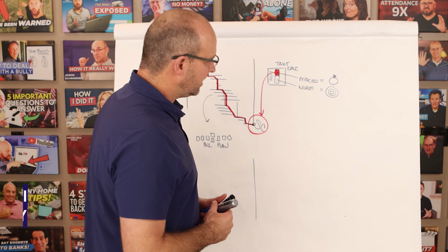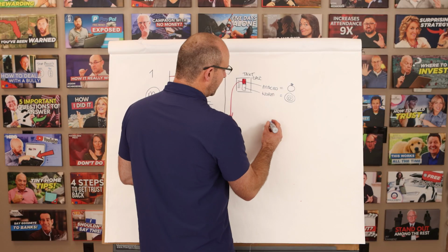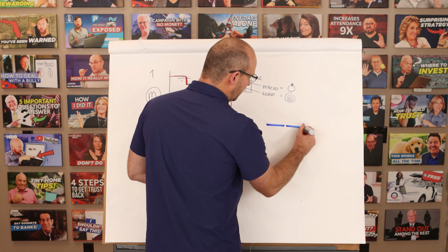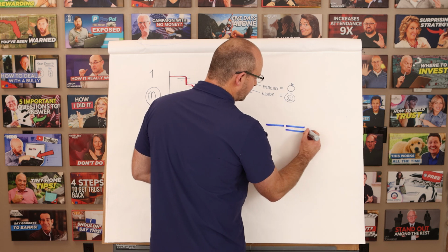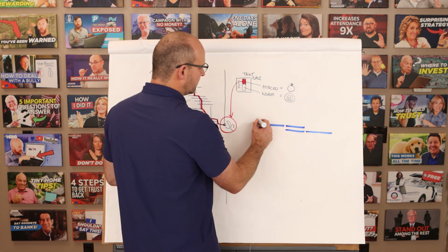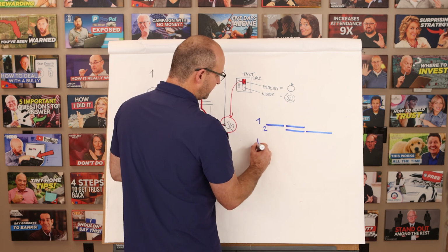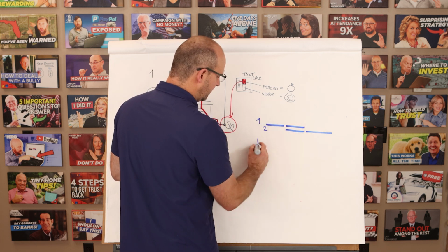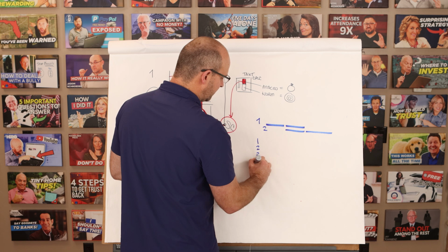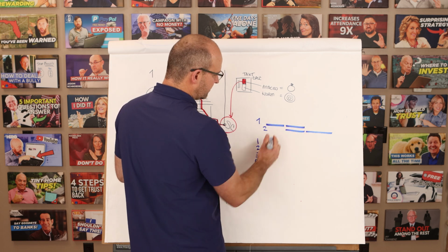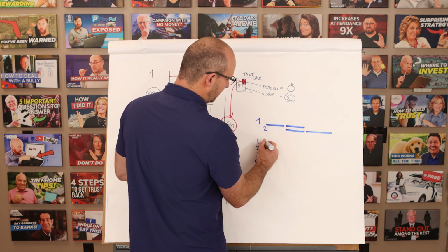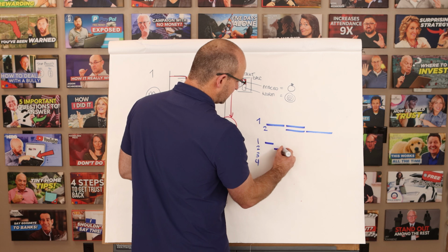And in case you're like, Jay Money, what are you talking about? Remember, I always draw this. If you have two crews and two zones, right? Zone number one, zone number two, and you just switch that to 4 zones, same amount of work, same labor, same everything, but you switch it to 4 zones. That means you have half the duration here, right? So that's going to start to look like this.